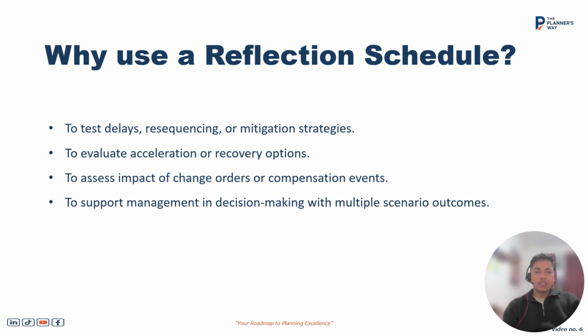The main reason behind using a reflection schedule is to analyze different what if scenarios without impacting the main program. That means in situations where we want to analyze different test scenarios, whether this activity has been impacted, what will happen, or we can resequence this logic, what will happen, in that instance where we are not sure about how to move forward. In that case, we can use a reflection copy of a program and make the changes over there, basically to play around with the activities to make a realistic program after making the changes.